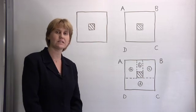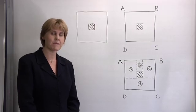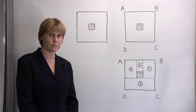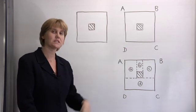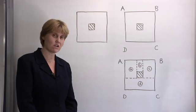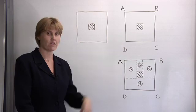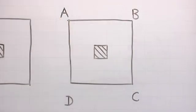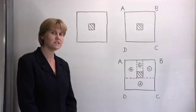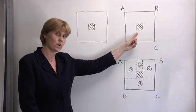Now let's look at both techniques. The first technique I'm going to introduce is the technique of measuring overall and then deducting. So here we have our kitchen plan. To calculate the area of quarry tiles we would measure the overall area of the kitchen, so we would establish the area of ABCD. We would then deduct out the area for our island worktop.